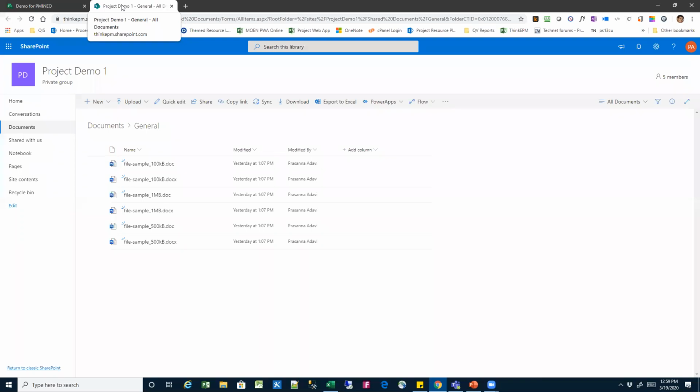Okay, then we have another question about assigning a percentage availability for a resource. For example, if they're not spending 100% of the day working on projects, can you assign a threshold? You can. That is where the Power Apps come into the picture. It gets into a little bit of custom development. You could arrive at similar results with a little bit of work on the durations and efforts. But if you want to limit the amount of time somebody can be assigned, you need to get behind the scenes. Basically, this entire data is being stored in something called Common Data Service. It's a database that's not unlike a SQL Server, but much more collaborative. So that's where you would make some of these changes. As of today, there might be enhancements in future that will allow you to do it on the front end.